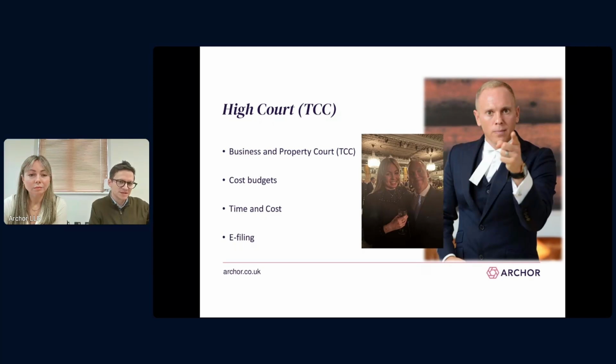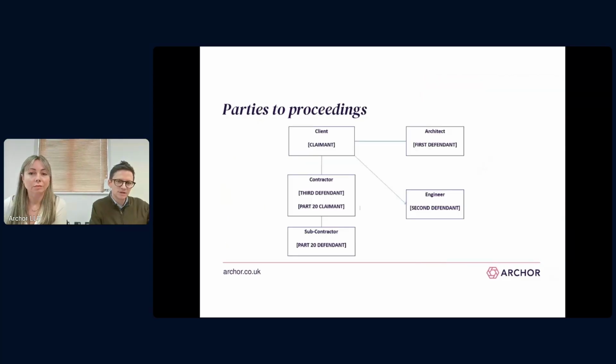Most cases in the TCC, until you get above £10 million, have a sort of cost budgeting process where budgets are exchanged between the parties. You each comment on them, and the court ends up making what's known as a cost management order, which sort of underpins costs during the process of the case.